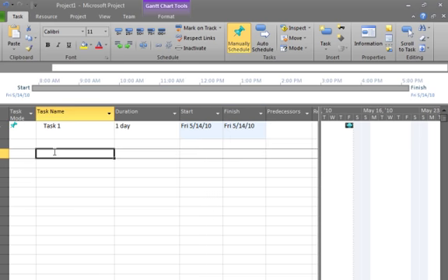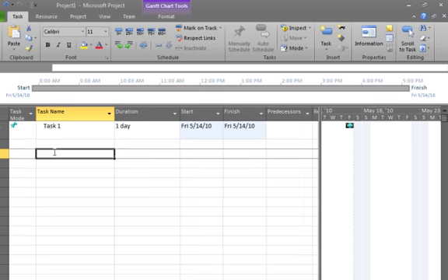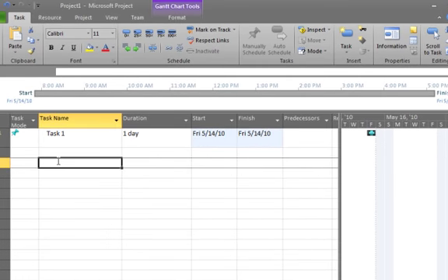So before you cringe too much, and I certainly did when I started looking at this, you might be wondering why you would use this task mode called manual scheduling? Well, there's a few reasons for why you might want to do that. First, as I just mentioned, top-down planning is a really good use of this functionality. I'm getting started on a project, I don't know the details, I'm not collecting actuals on it yet, I just want to put some placeholder information into it.